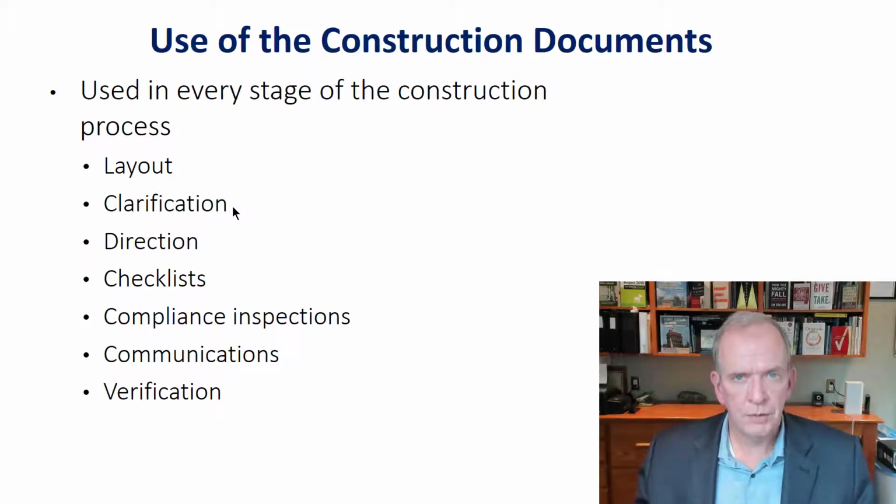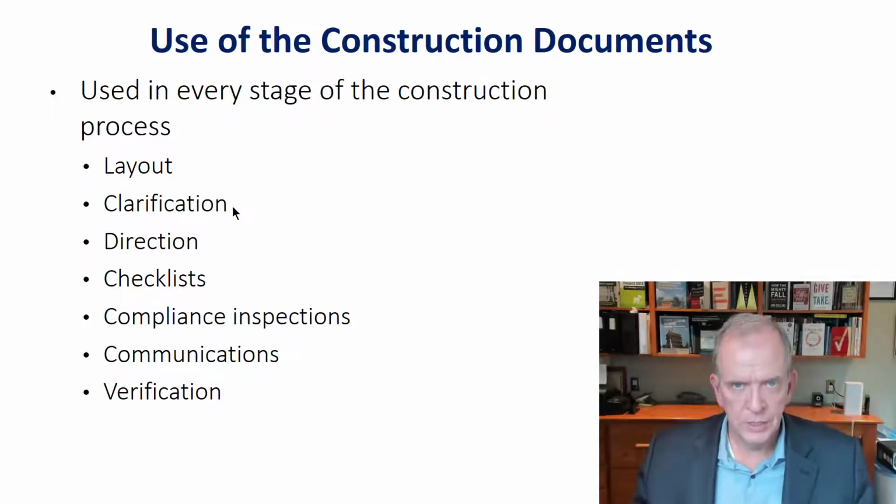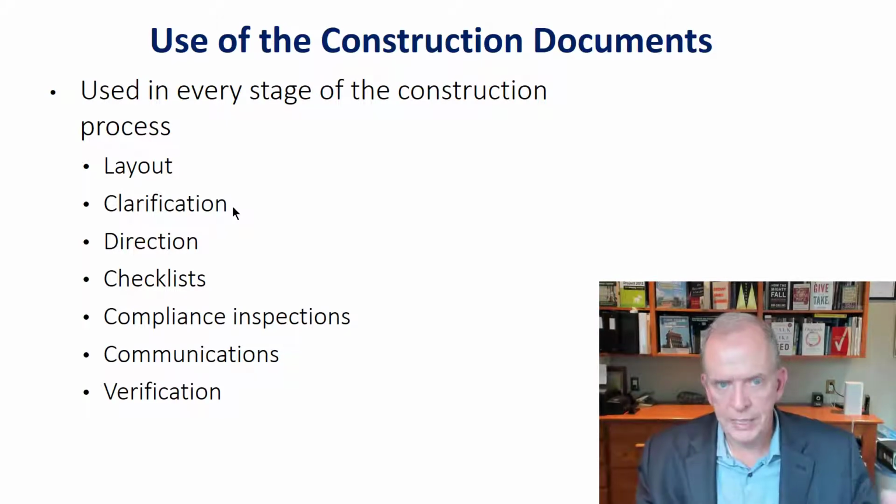We'll talk a little bit about that when we talk about lean construction, because lean construction requires a little bit of different thinking. Traditional construction is kind of push, so we start at the beginning, we think this, then this, then this. Lean is kind of pull. What do I need to get this done?